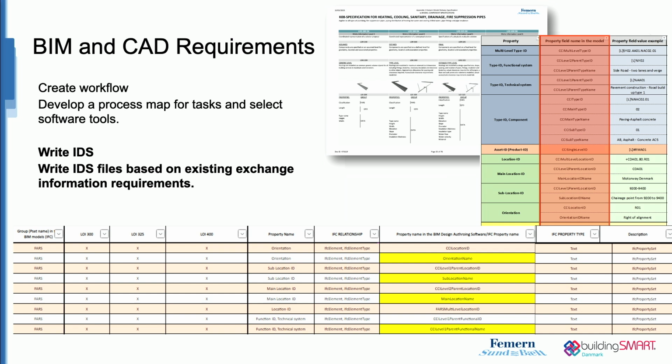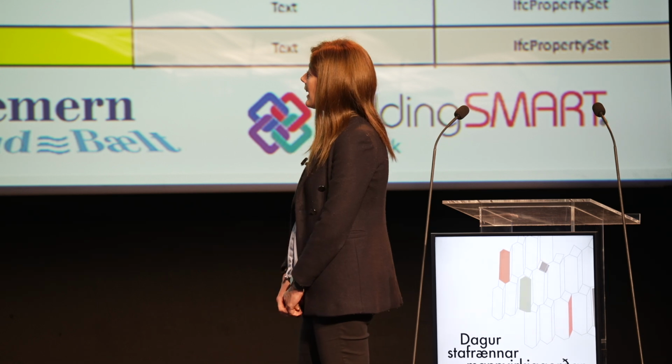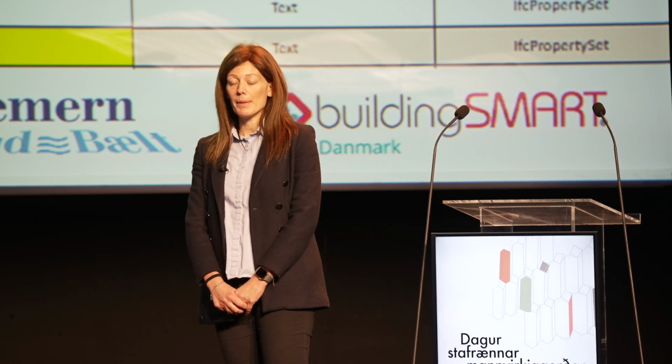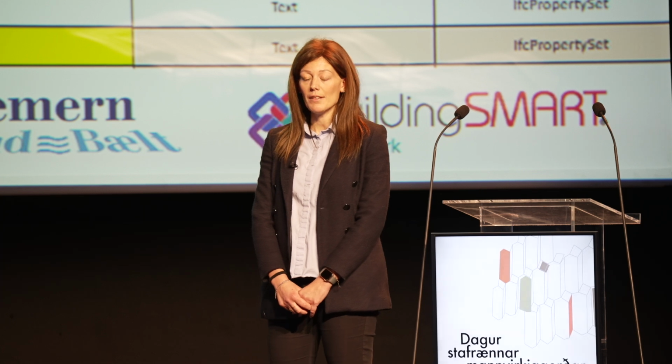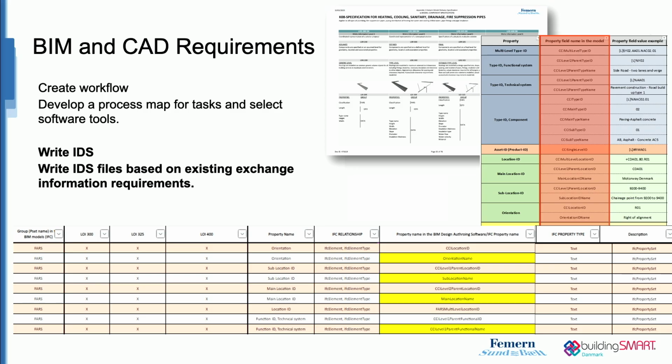Then our first white list of code, that is our asset classification that is currently in use in the Fehmarn Belt project, and a mapping table that represents the mapping between the object itself and the properties that we are requiring to have for each object or categories of object.